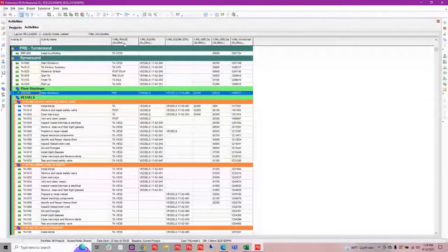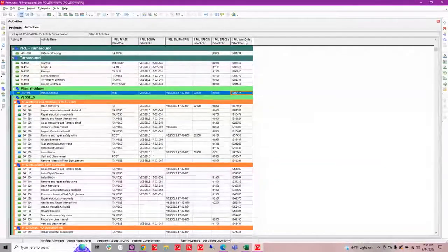Now, I also have a phase code that's at the global level, and I really just don't need that phase code at the global level. That's actually pertinent to the EPS that this project is in. So I want to push that down to the EPS level so that the projects in this EPS can utilize this code. I also have a work order code that is at the global level as well. And really, the work order is only pertinent to my project. So I want to push that down to my project level.